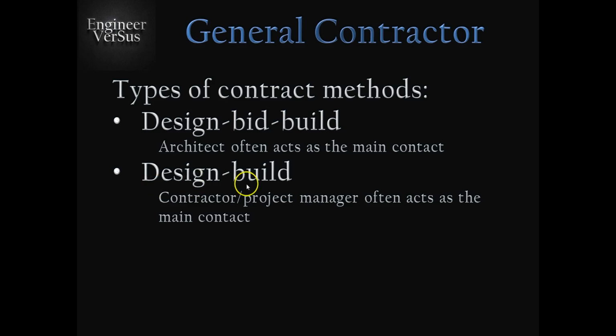A design build means that you have the contractor or the project manager acting as the main contact, and they will go and take your complete project, or the project that you want to have done, and they will start to parse it up, and they will talk to different subcontractors, and they will take on the entire project, and they become that single point for you to control, and it also becomes a single point for you to pay as well.